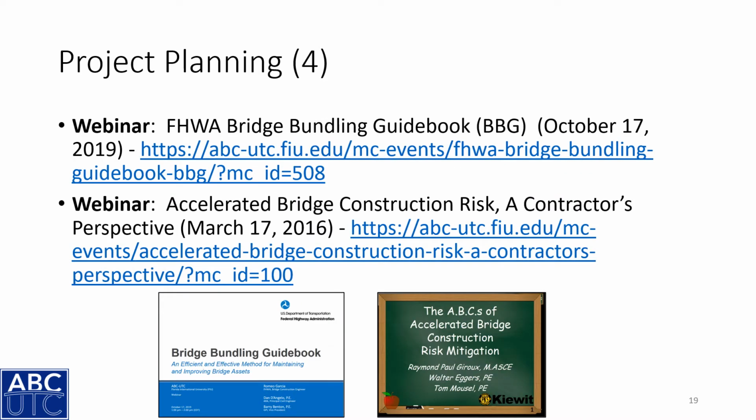The next webinar that I'm highlighting here is FHWA's webinar on bridge bundling, or their bridge bundling guidebook. With ABC projects, it's often better to group a number of bridges that have either similar characteristics or maybe are in a similar geographic region, and to let them out as one larger project. So FHWA talks a little bit about that in this webinar.